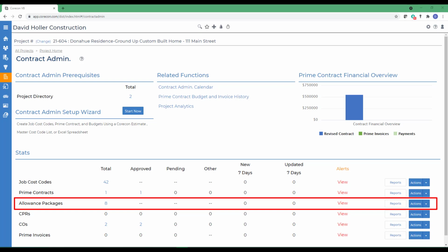An example would be kitchen appliances. At the time a builder or contractor is preparing a bid or proposal, you may not know what the project owner, client, or customer is going to select. You might quote a builder grade appliance package, and later, when the owner has time to select the package themselves, make an adjustment for the difference.